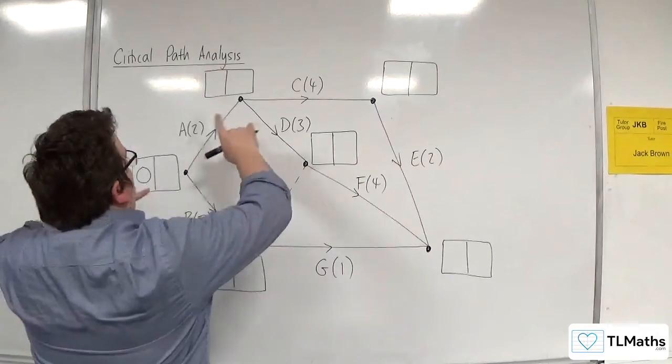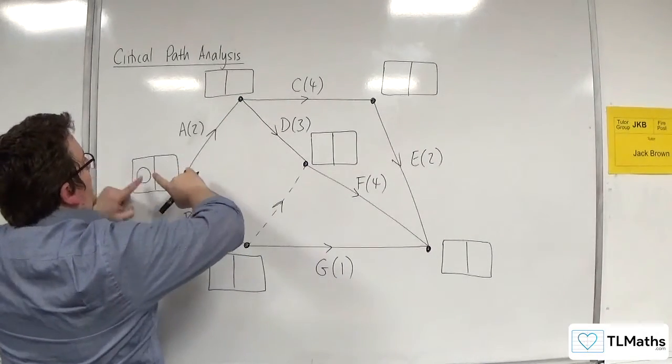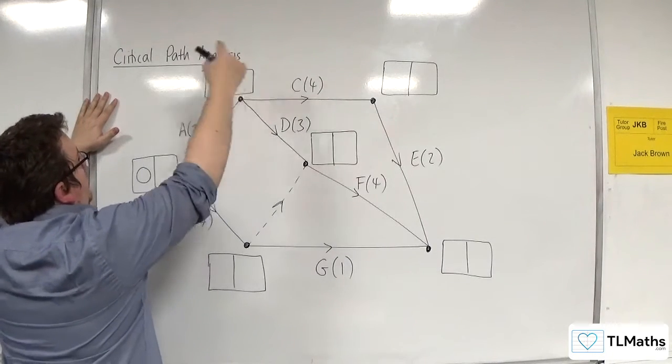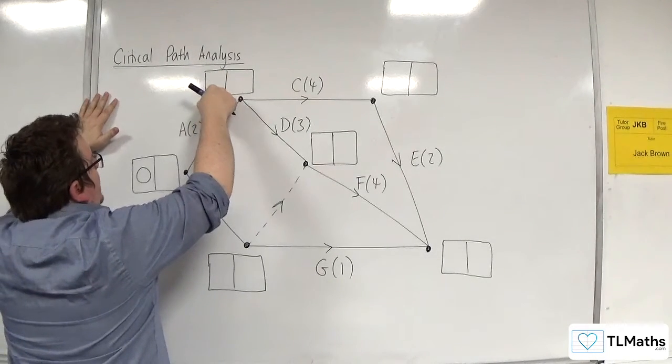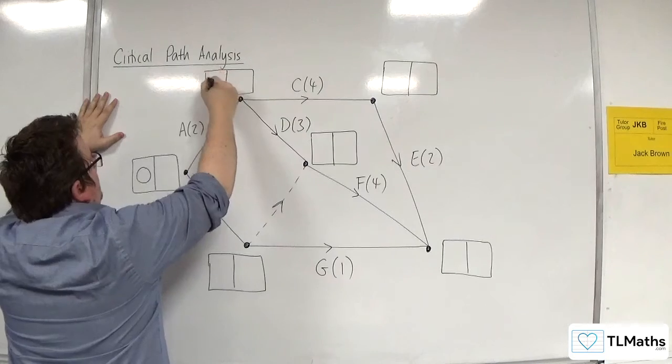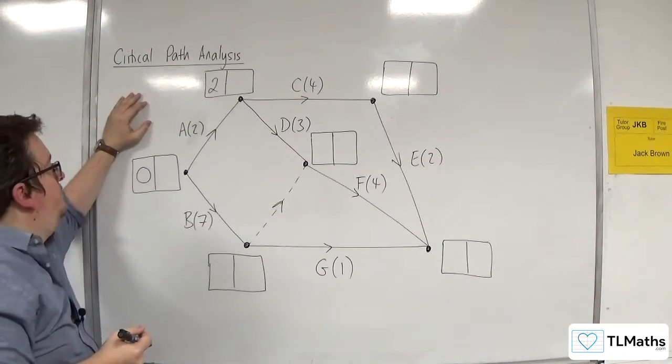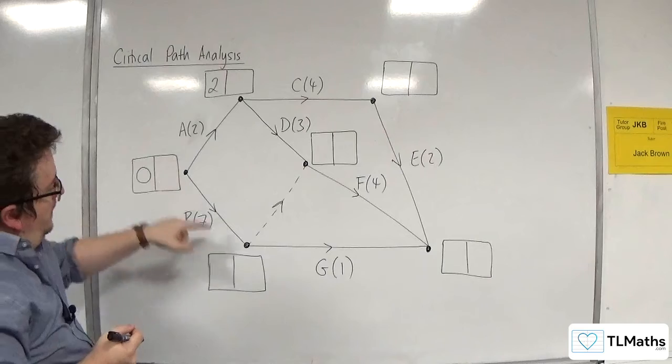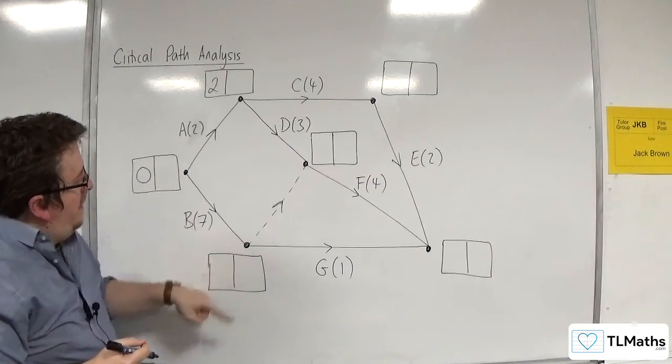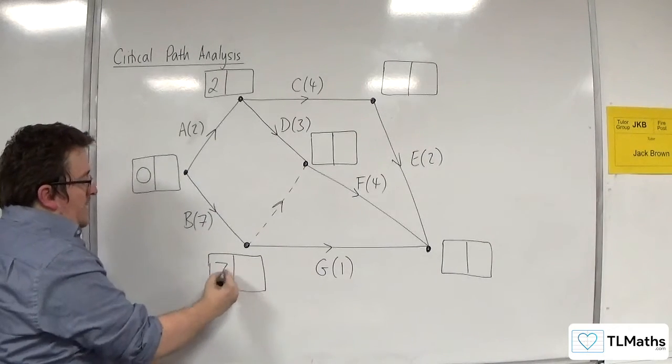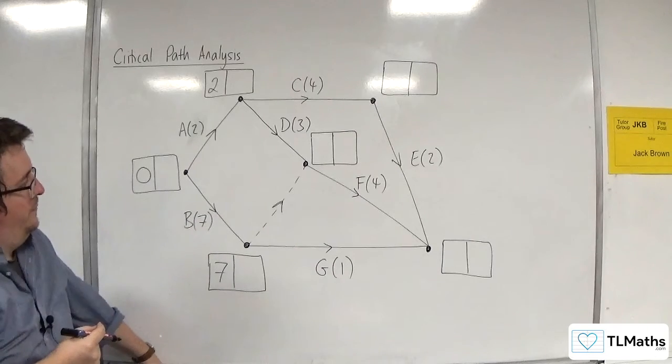So let's look at this one first. So there's only one arrow going into this event, and that's A. So the earliest time that I can get to this event is at two, because two hours have elapsed. Now, as for this one, there's only one arrow going into that one, so I can go, the earliest time I can get there is seven.